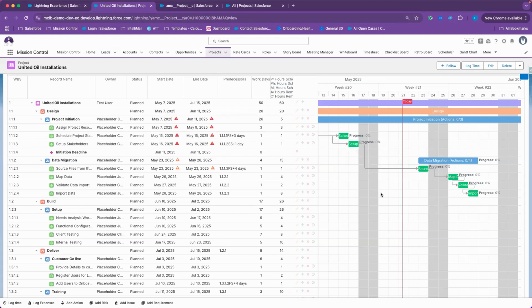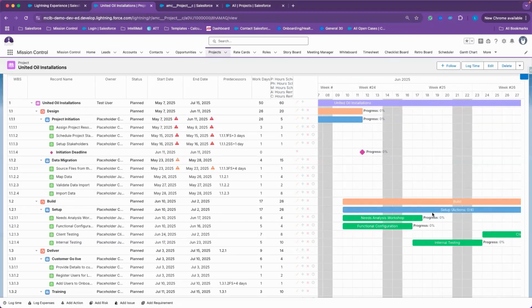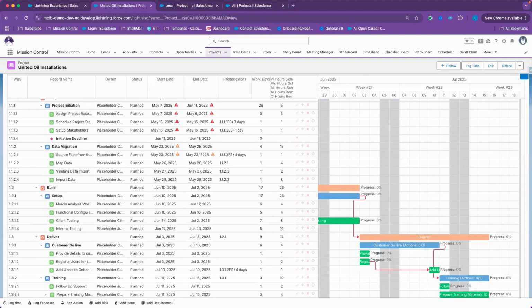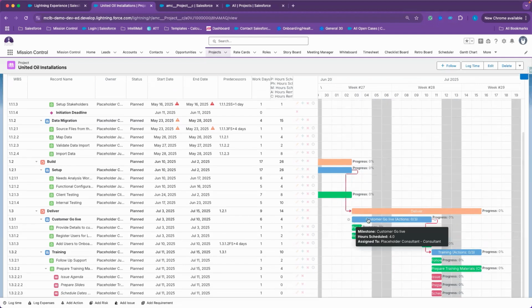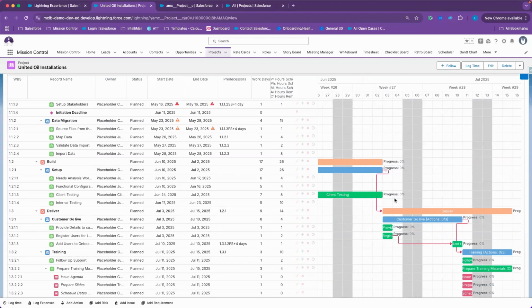Before getting into constraint scheduling, I do want to show you how you can cause a project to have a critical path. Sorry, my mind is blanking. So when there is no slack allowed in a project, and what I mean by that is if I'm going to reschedule any of the tasks within this area of the project, it can cause my entire project to not be delivered on time. So when the bar turns red, there is no slack allowed. Otherwise, all of the tasks in this area will push out the end date of my project. You can still have lag and lead between the tasks, but more so focus on the ending of the project will be affected here.